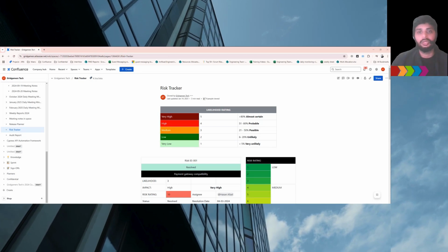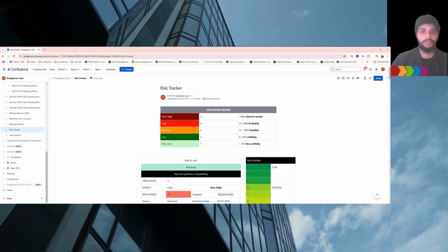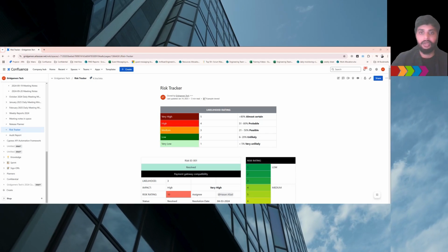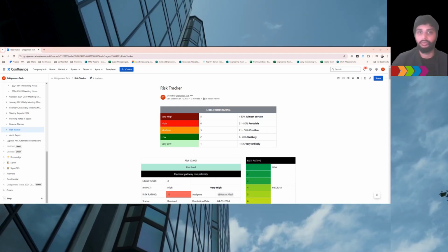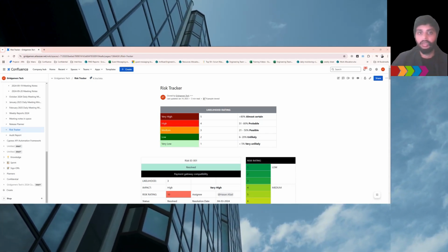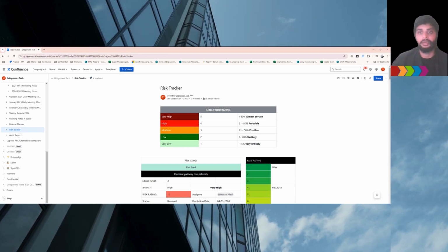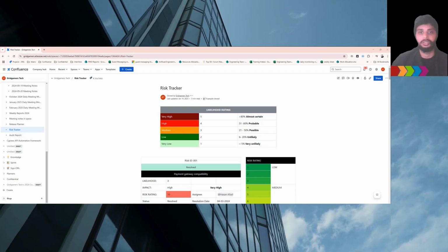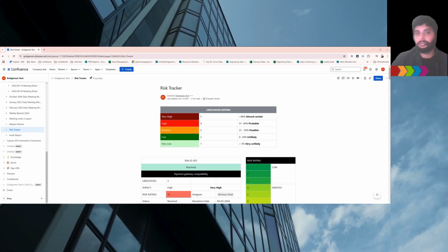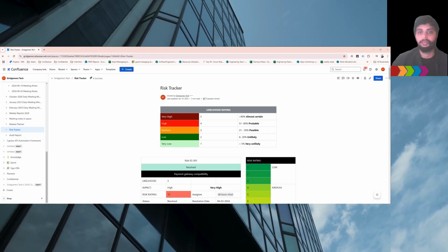How do you use a risk register in different software development methodologies? In waterfall, risks are identified and documented upfront, and the register is used throughout the project. In Agile, risks are identified and addressed in each sprint. The risk register is often simpler and focuses on immediate risks. Regular sprint retrospectives also help identify and address emerging risks.